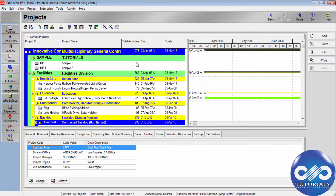If you select all, you will be able to see how all the project codes are applied. This is how we define the project codes, set them up, assign them to the projects, and use these project codes to organize layouts by grouping, sorting, and filtering.